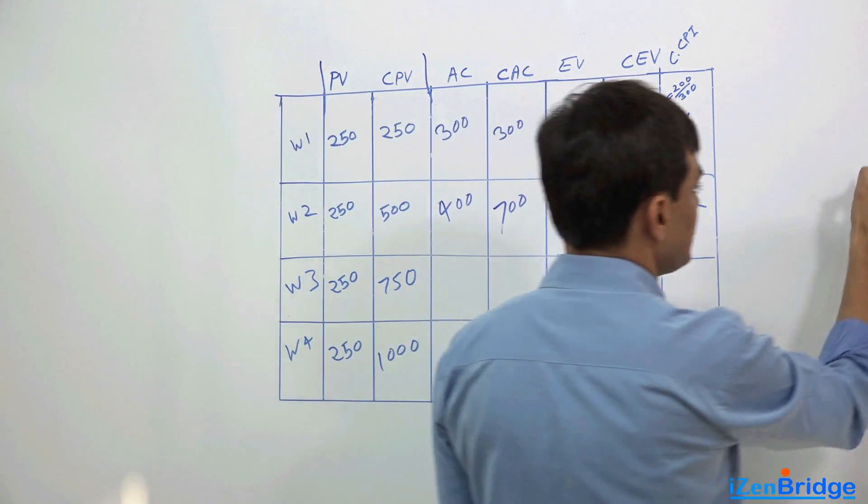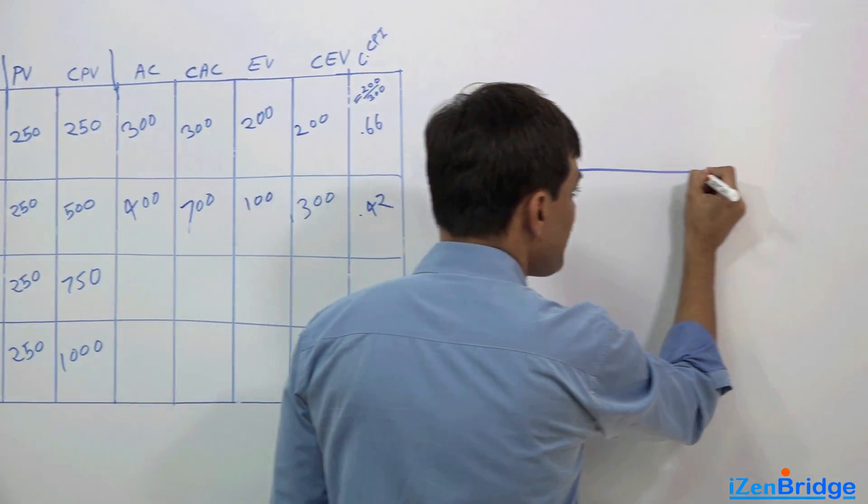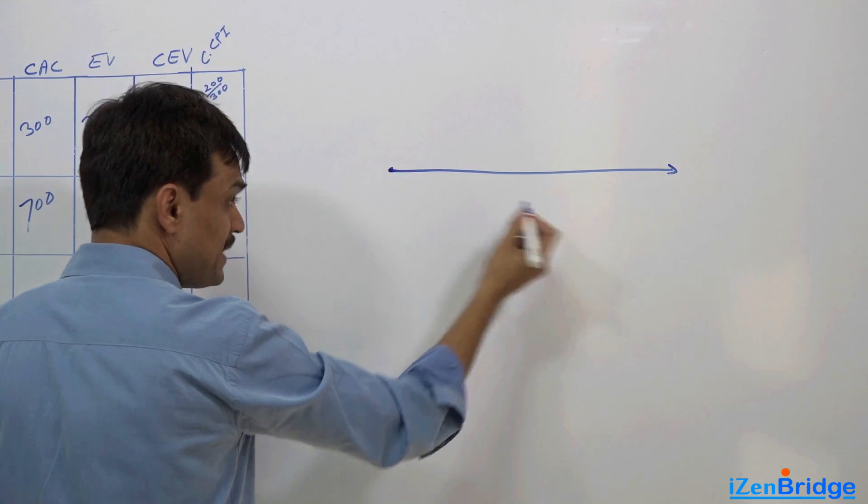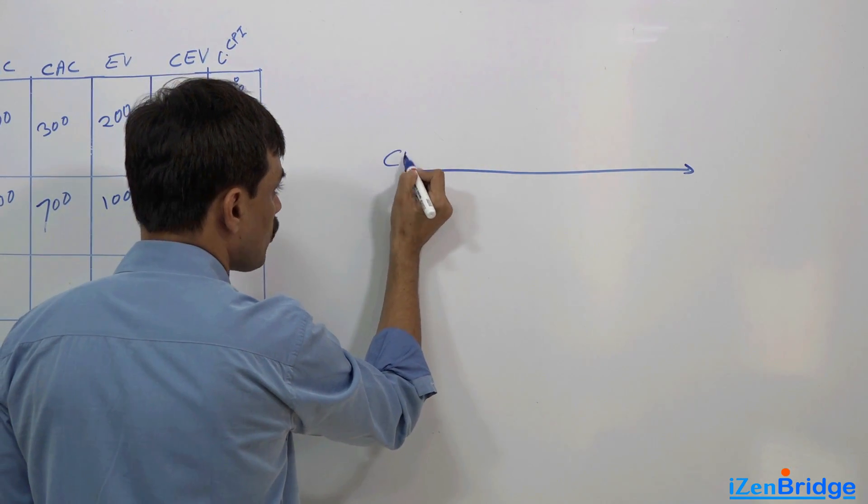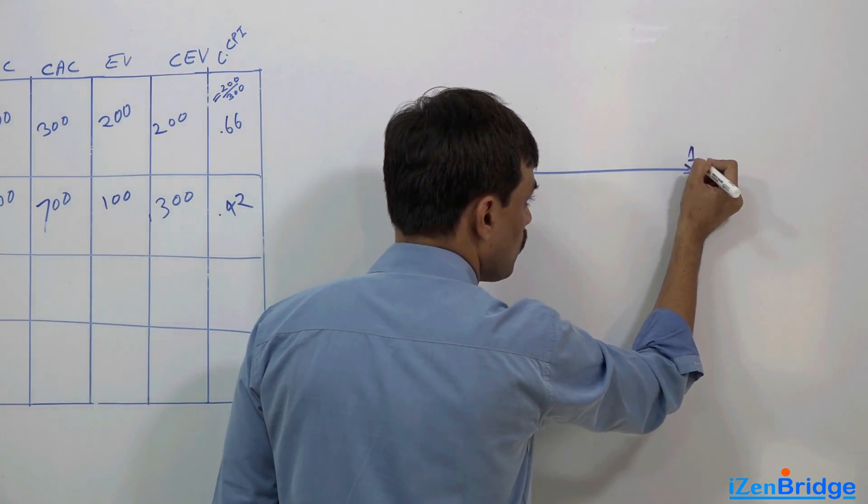If I cumulatively calculate cost performance index at the end of week 2, it comes to 0.42. Now let's look at it in a different view. As a baseline, the expected cost performance index is always 1.